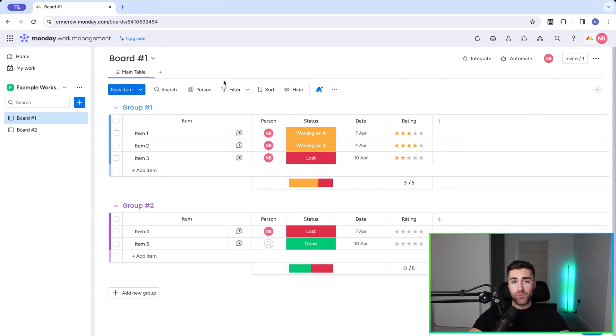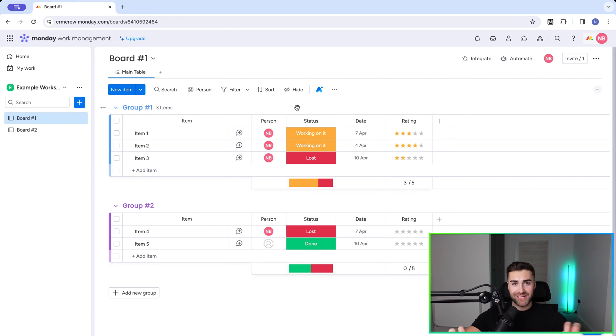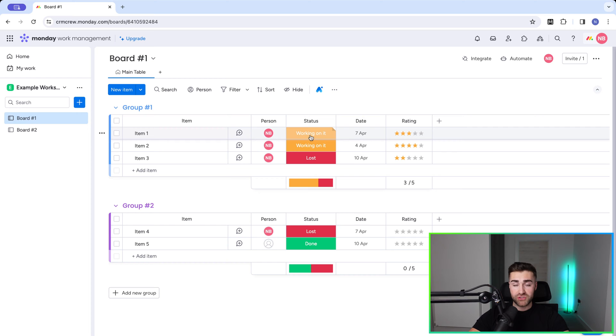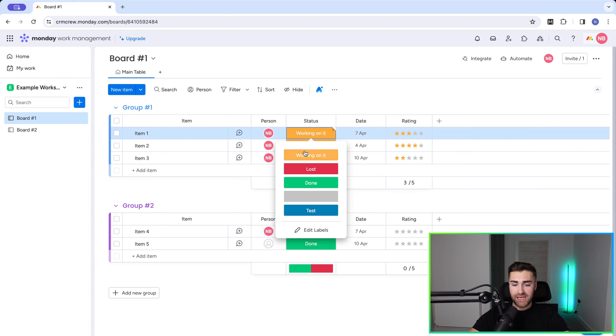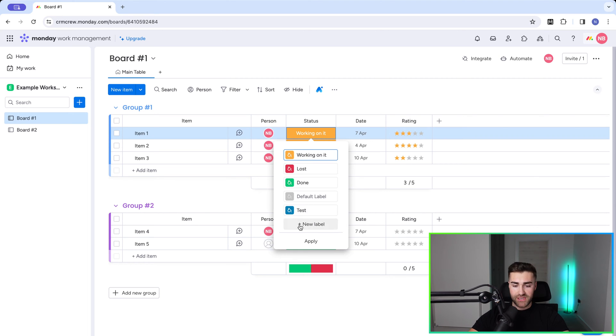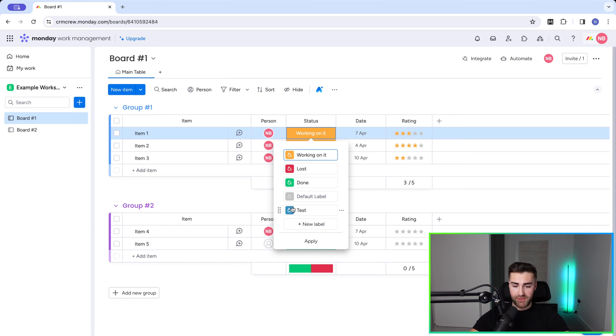Now we can use that for a number of different things and I'll show you how in a moment. But what does step-by-step actually look like? Well in most instances it's going to be dictated by the status options on a status column. So as you can see here we've got working on it, lost, done and test. Well because it's a test environment. However we can go ahead and add additional labels and that would actually allow us to create more steps in our Kanban view which I'll come on to in a moment.